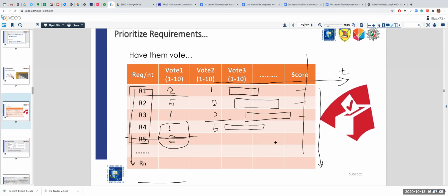When you collect contributions by multiple stakeholders, errors tend to identify themselves. Why? Because when you cross-tabulate the information from the multiple stakeholders, you will be in a position to identify the outliers. Got it? If you have a very small sample, then it's going to be very difficult to distinguish. If you have a large sample of interviewees, then the outliers will pop up.